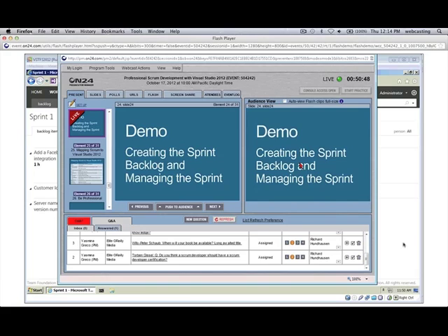But what I have done here is I've made a two-column mapping of concepts in Scrum and where or how are they supported in Visual Studio. So, for example, the product most likely maps to a single team project, and then the product backlog would be a query that brings back all the PBI and bug work items together. A PBI is a PBI or bug work item. Let's see, look on the list here. An impediment would be an impediment work item.